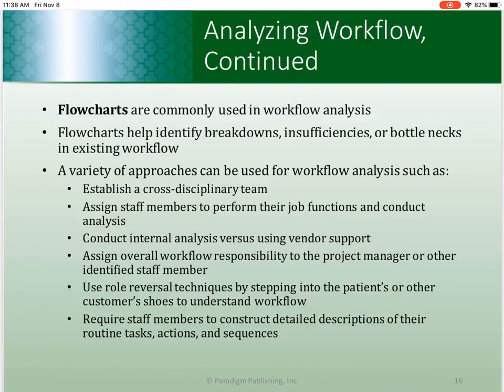So your chart is going to actually help identify locations of breakdowns, insufficiencies, or bottlenecks. And so when you have the information and knowledge from a flow chart, then the facility will be able to isolate the challenges to the flow of patient information, and then they can find a vendor that can address these workflow problems before final implementation of your EHR system.